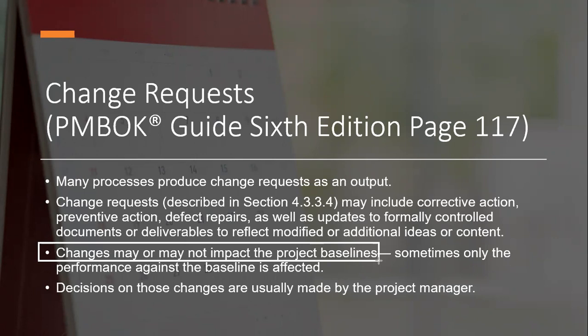It does not affect the schedule. It does not affect the cost. It does not affect the scope. We just need it to be reported differently. So think about that. The performance of the work in terms of how you report the work could change, right? But it doesn't change the baseline.